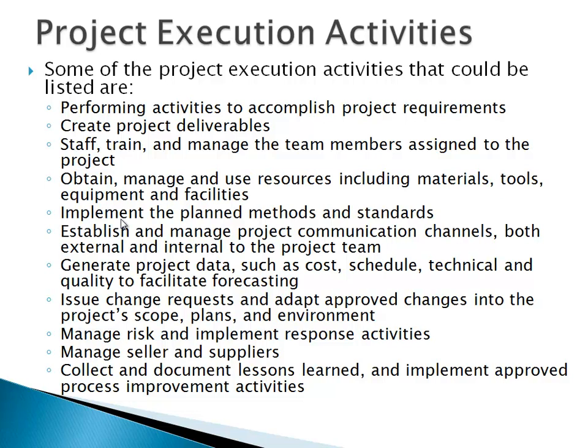and predict the project execution, or during the execution what will happen, what issues might come up, and what changes are needed. And then we issue a change request based on those issues and adapt the approved changes into the project scope, plans, and environment. And any risk that happened or that popped up, we manage that risk, implement the proper response for it, and mitigate that risk.